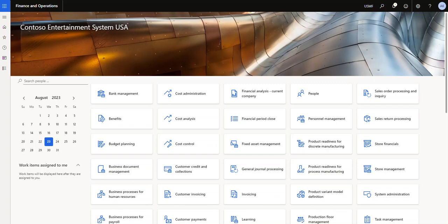It also gives you the ability to put a budget against it. So that way you can say, hey, I'm starting this project, it's going to cost me X number of dollars. And then you can do budgets to actuals for that specific project. So when you think about project management accounting, just think of it like that. Think of it as a way to gather cost. And again, you can do different things with those values, that money that you're doing there.